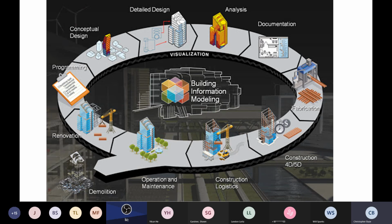In the case of concrete construction, what are the various steps? You're placing formwork, you're dropping in rebar, you're pouring concrete, stripping formwork, and each of those individual steps uses crane time, and then the aggregate shows you a picture of how long that column took, or that wall, and then you can step back and say, okay, well, how long did this take relative to the other ones? Why are some things taking longer than others? And that's how you really start to turn some of these metrics into actionable insight that help you increase the efficiency of your jobs.